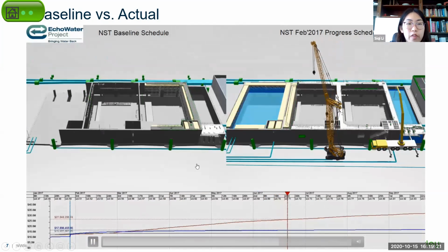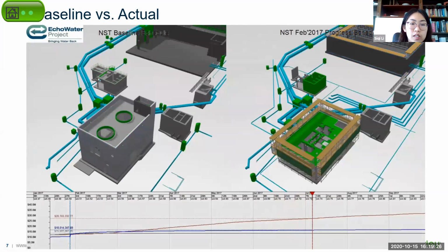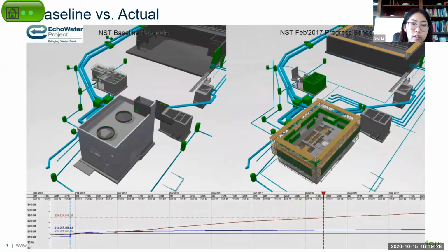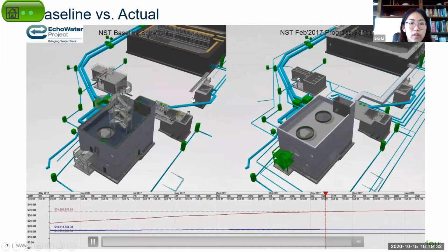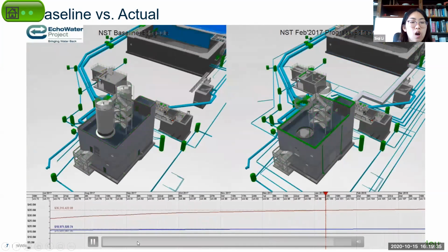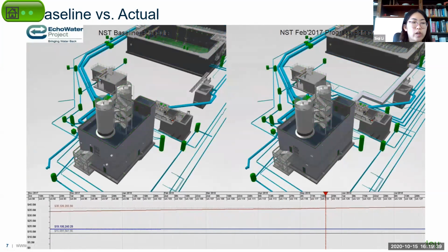A fun story about this project is that when we first met with the client, they gave us the schedule for about one year. And then we linked the models with their schedule, and the process we link the model is that we sit in together with their project managers, project engineer, field engineer, and other people, schedulers. So we sit with them together, and we assign the resources to the tasks in front of them.